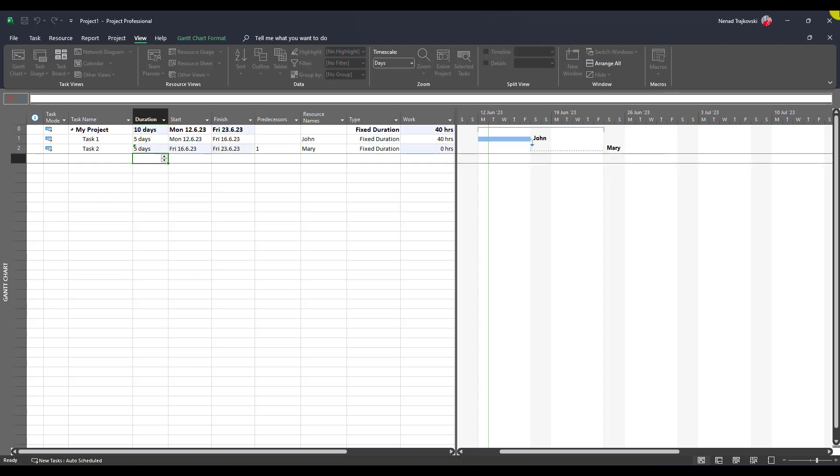You will see Mary will not work. So basically when you have your task with fixed duration in which you assign resource which is totally unavailable, it really doesn't make sense.